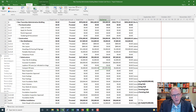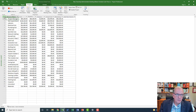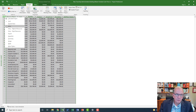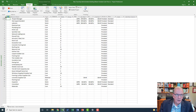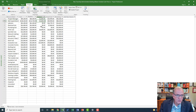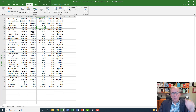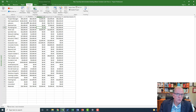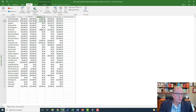I slide to the left, right-click, slide down, go to my resource sheet. In this case I've already got it in the cost screen, but when you first open it you can go to the cost screen and see individually how each resource is doing compared to what we planned. If this stuff seems foreign to you, go to my playlist and look under cost loading of resources. I could see which resources are over budget compared to what I planned, and that's giving me my variance.